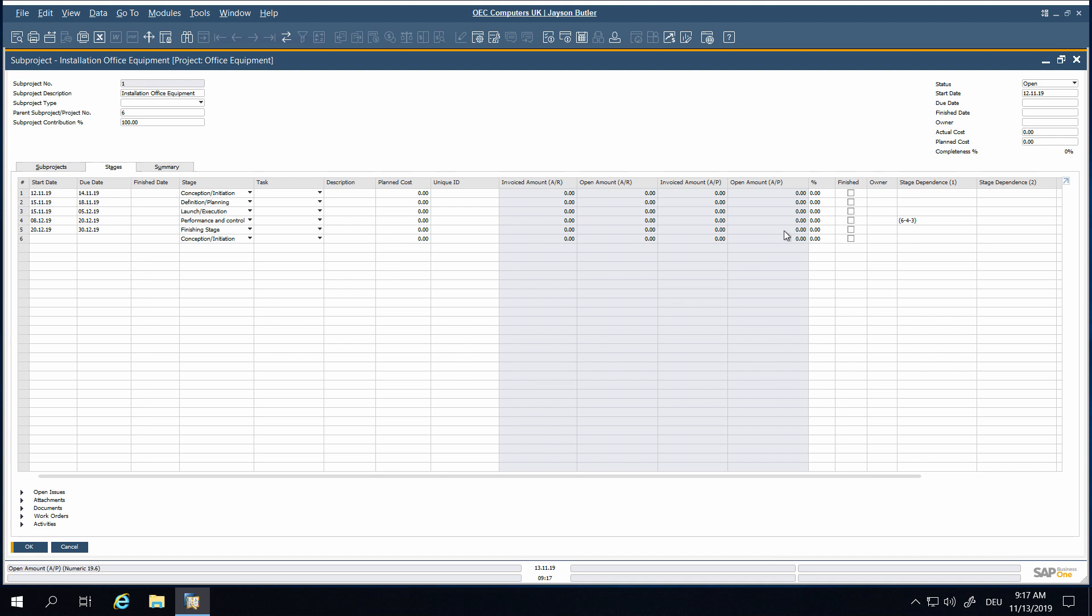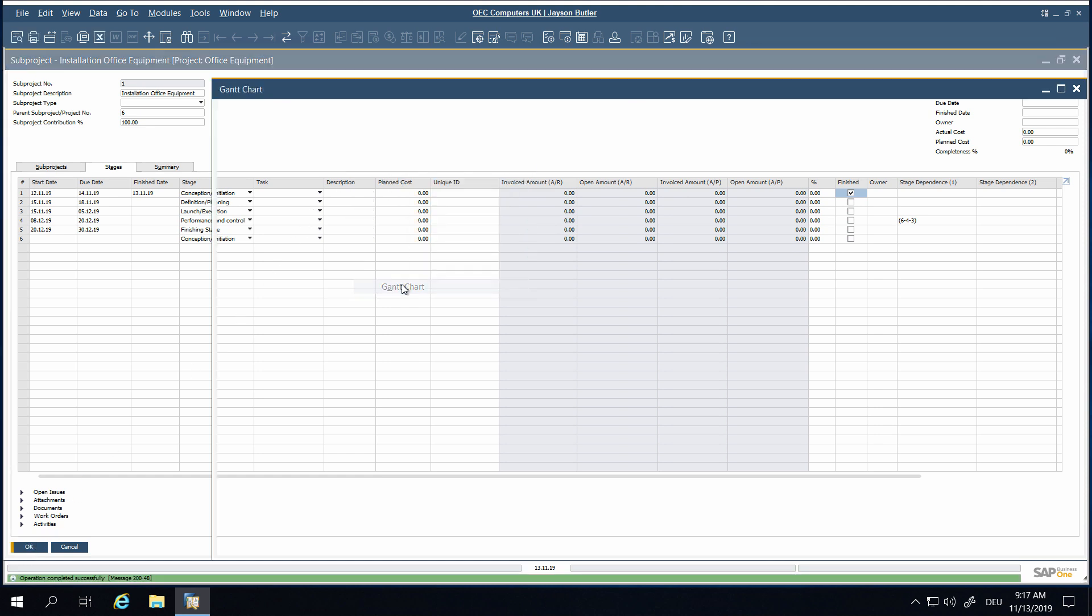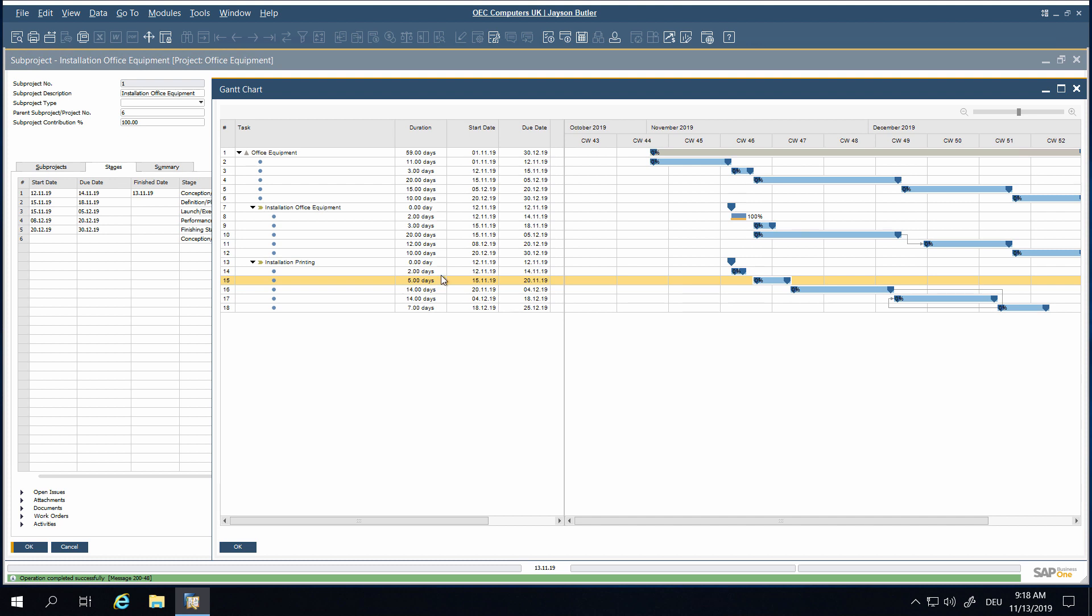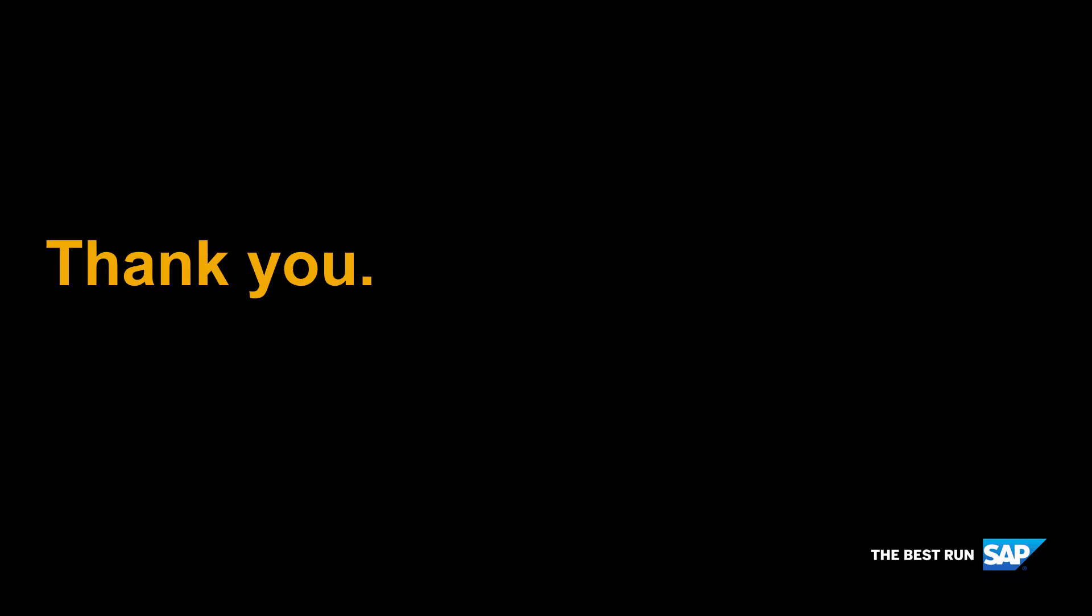Setting project stages to Finished will be shown in the Gantt chart, and these stages cannot be changed anymore in the Gantt chart. Thank you!